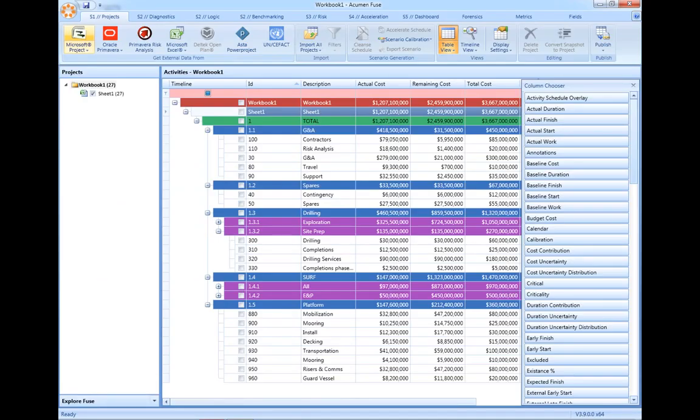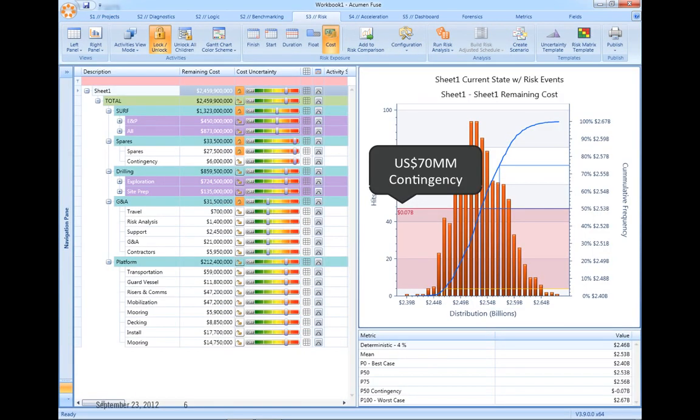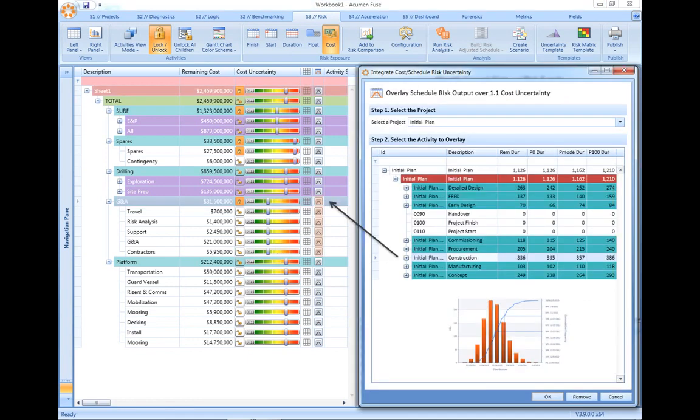Acumen Risk is as much a cost-risk analysis tool as it is a schedule-risk analysis tool. Analysis can be conducted in isolation of the schedule, or, as is more common, the impact from our schedule risk exposure can directly be linked back into our cost-risk model.